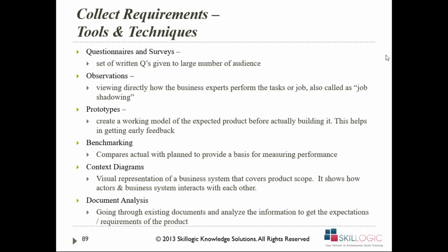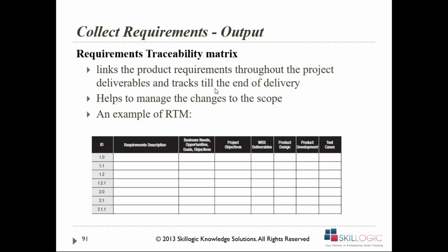Now, all these tools and techniques we can follow for understanding what my requirements should be. Next, we need to document these requirements in the requirement traceability matrix. The requirement traceability matrix is nothing but the different requirements that we have, and the business need that each particular requirement is taking care of.